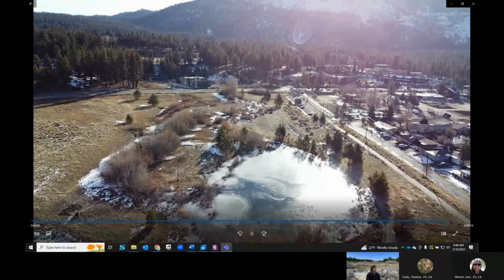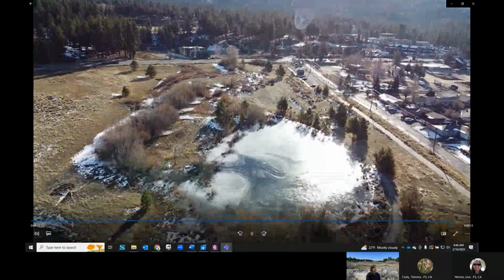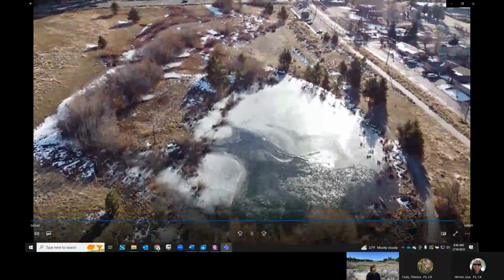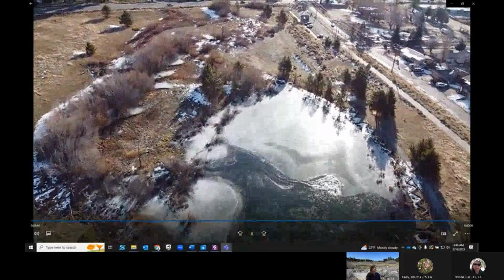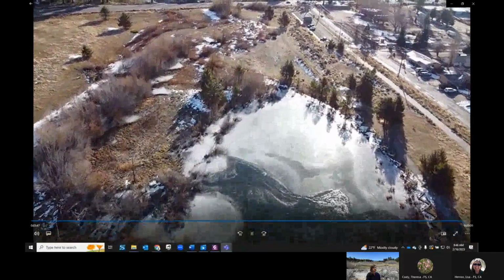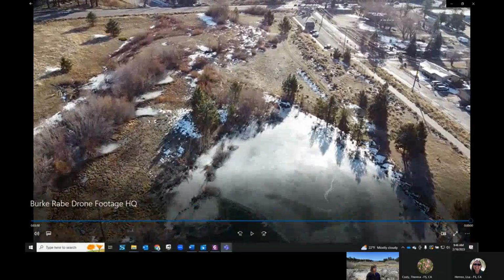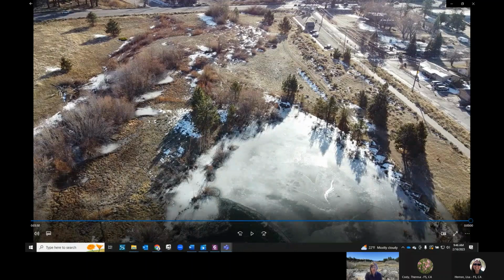And this last view here is really good because you can see where we'll be coming into the Lamb-Watah trailhead, using up to 4 parking spaces for up to 6 weeks, coming into the project site to do the construction of Subproject Area 5. And that's an overview of the project, and I'll turn it back over to Teresa Cody to explain more. Thanks so much, Megan.